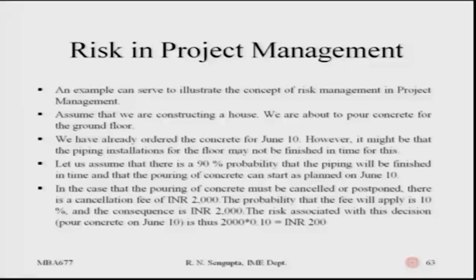We have already ordered the concrete for June tenth; however, it might be that the piping installation of the floor may not be finished on time. As stated in this slide, there is a ninety percent probability that the piping will be finished in time and that the pouring of concrete can start as planned on June tenth.